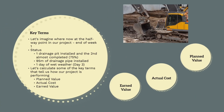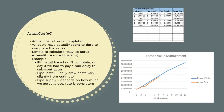Our actual cost will be the actual cost of the works completed, so how much we have actually spent to date on the project. This is easy to calculate and can be calculated by tracking all expenditure to date on the given scope of works. We do this through cost tracking, which we will touch on in later sections. I've attached an example summary of costs incurred against each item for pit install, pipe install, pipe supply and total actual cost.